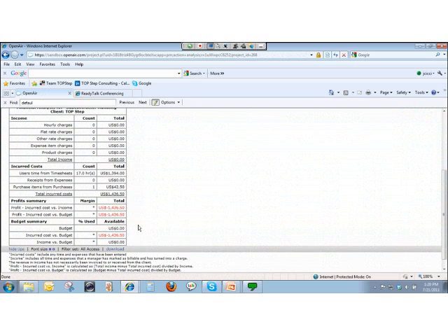Okay. So if I turned around and tried to, I could rebill that to a customer because I have one fulfillment record, which even though there's 5 items in it, it's sort of the same as saying I'm invoicing one receipt that says I purchased 10 notebooks. Okay. So this is the cost now against the project, but you'll notice it's only $42.50. It's not the full 15 hamburgers at $8.50 a piece. Okay, it's only the amount that has been invoiced to me, so that's when the cost hits the project. Okay. Unlike expenses, the minute you put an expense report in the system, all the cost of that expense hits the project.